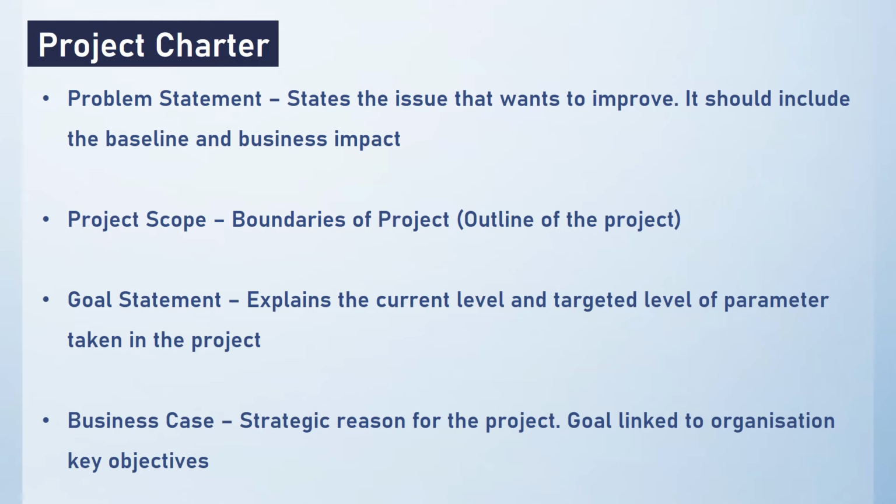And the business case is the strategic reason for the project, and the goal linked to the organization's key objectives. So why we are taking this as a project, it should be in line with the organization goals, properly linked. For example, we were talking about the casting rejections. So there, if we reduce the rejections, our capacity will be improved, so that the organization will benefit in meeting the customer requirements when demand increases.